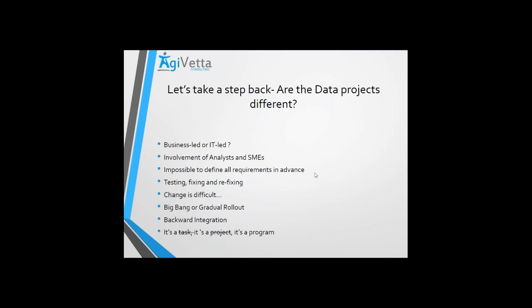Next problem, or the next challenge we need to look into, is that change is difficult. A lot of times when you initiate your BI and data warehousing projects, the end users and stakeholders are very used to using maybe an Excel sheet or any other form of collating data, and it is very difficult for them to move to a well-known system. It takes a transition time. Till that time, your data that might be entering might be corrupted, it may not be complete, or it may simply not serve the purpose.